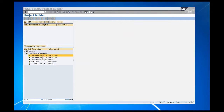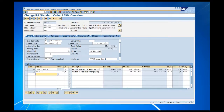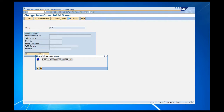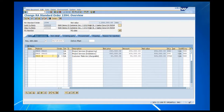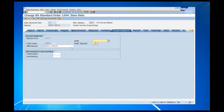Now let's look at the sales order behind this particular project. It's an SAP standard sales order. What's interesting about this particular one is that it represents an opportunity to easily have the sales order as an umbrella revenue collection vehicle for all the WBSs related to either this project or multiple projects. Here I've got two WBSs, and I've also got customer materials that I'll be charging for and delivering as a result of what I'm doing — perhaps engineering, perhaps installation. If I drill into account assignment, I'll see the linkage to the WBS structure.